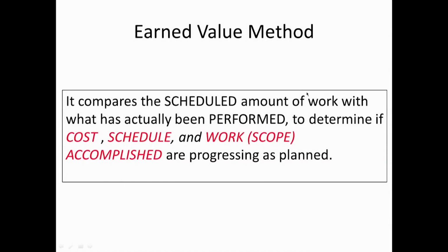Now, moving forward, if we look at the earned value method, it's quite comprehensive, quite popular and very powerful, because we are able to monitor based on the amount of work which has actually been performed. It's not based on money spent or man hours spent or anything which is more subjective. It is on what is actually done, and it is able to integrate the cost, schedule and work scope. So this is the key part of why earned value management: its cost, time and work scope integration is brought into a metric which can give you an idea of how the project is performing.